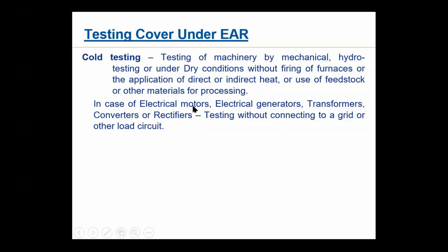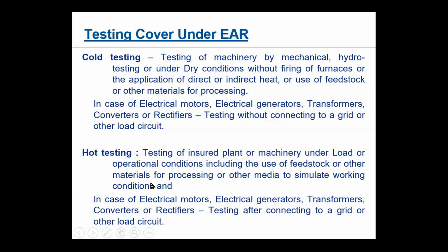Now hot testing, the difference is just that. You can test in operational condition, including use of feedstock and other material. That means you can apply heat, you can use feedstock, you can use firing of furnace, all these things, application of direct or indirect heat, everything, for processing or other media to simulate working conditions. Now you are simulating the actual working condition and testing. Now it is hot testing.